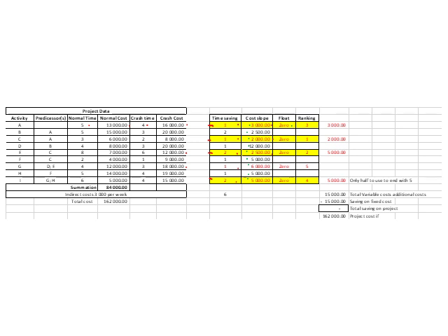All the ones marked in red, or 0 here, are our critical path items. From your cost slope you rank your items. Item C has the least cost, so it's ranked number 1. Item E is ranked second because it has the second lowest cost slope, and rank number 3 is item A with 3,000.